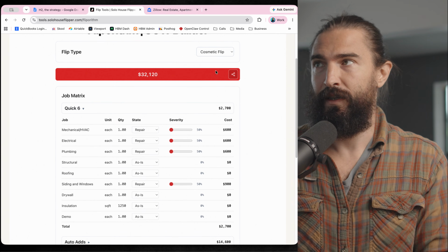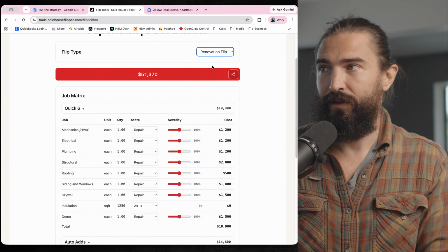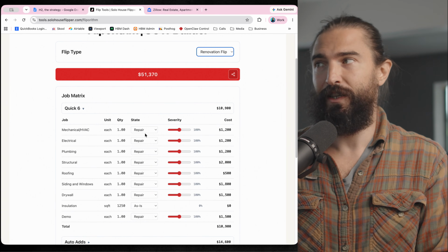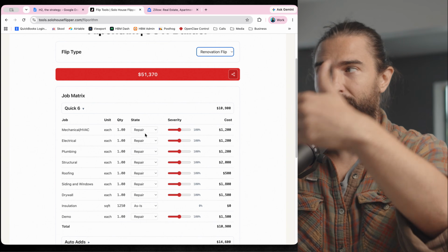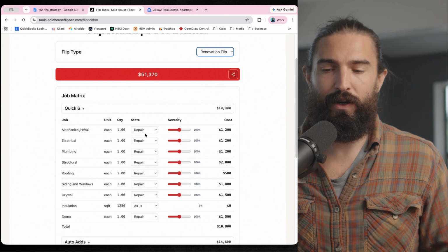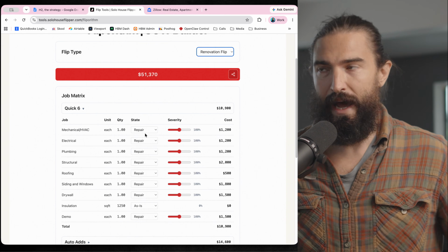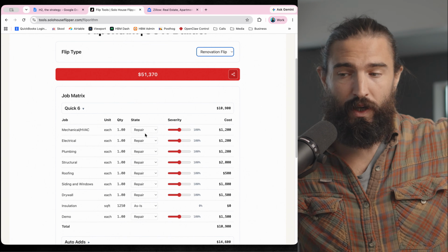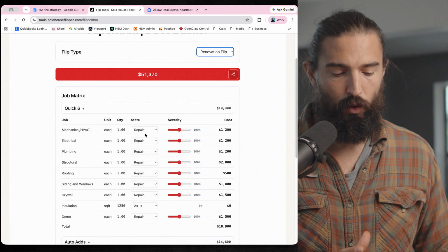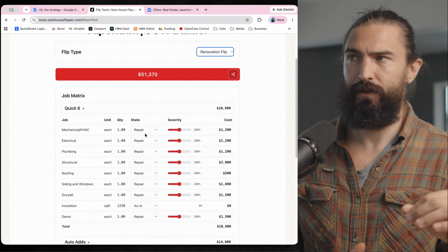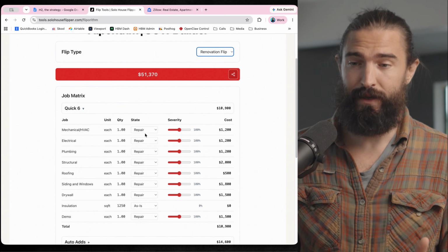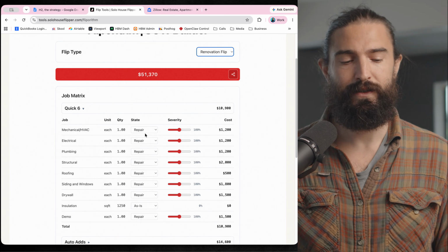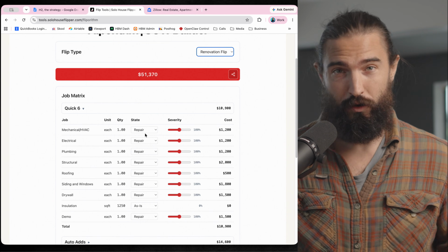And then if it's a renovation, you see, now I have repairs on all these things. So the budgets go up a little bit. Once again, even if I don't have any HVAC, I put a little bit of budget there. And let's say I do have electrical. Well, now if electrical ends up going over a little bit, I have some makeup room for it. And, guys, yes, later on, I get a little bit more specific with my scope of work and my budget. But the truth is, a core belief of my philosophy is that budgets are only what you manage to.